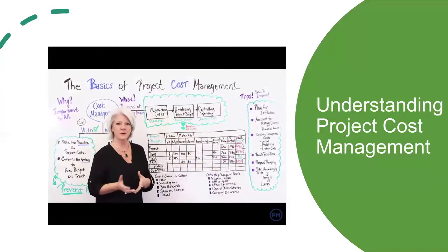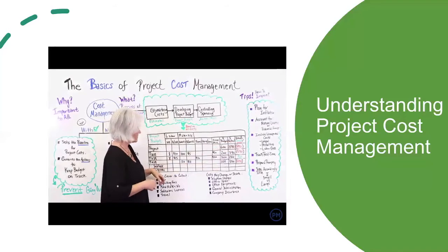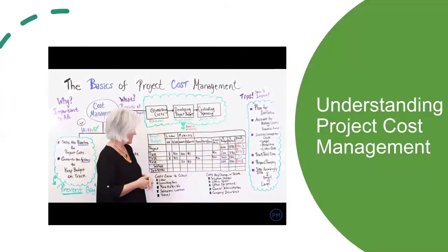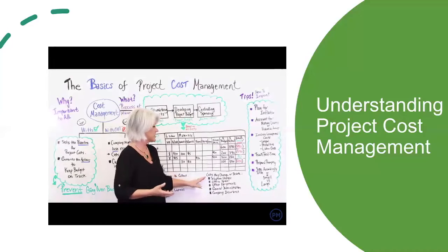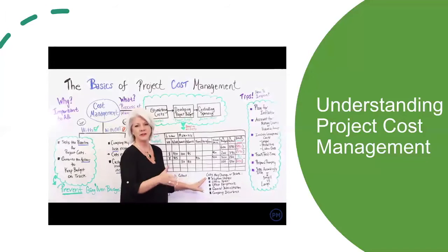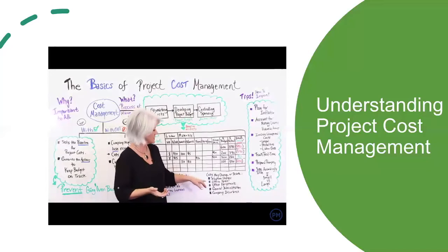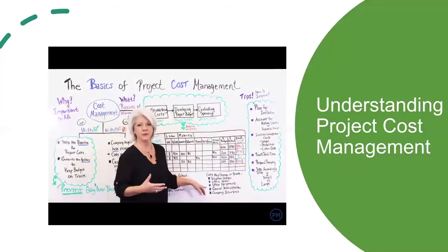There are a few things I want to point out on the template. Some costs are easier to collect. Those look like your labor cost, your consulting fees, your raw materials, your software license, and even your travel cost. Then some of the costs may change, or they may be shared among other projects, or they may even carry over to other projects. Those look like your telephone charges, your office space or office equipment, your general administration, and your company insurance.